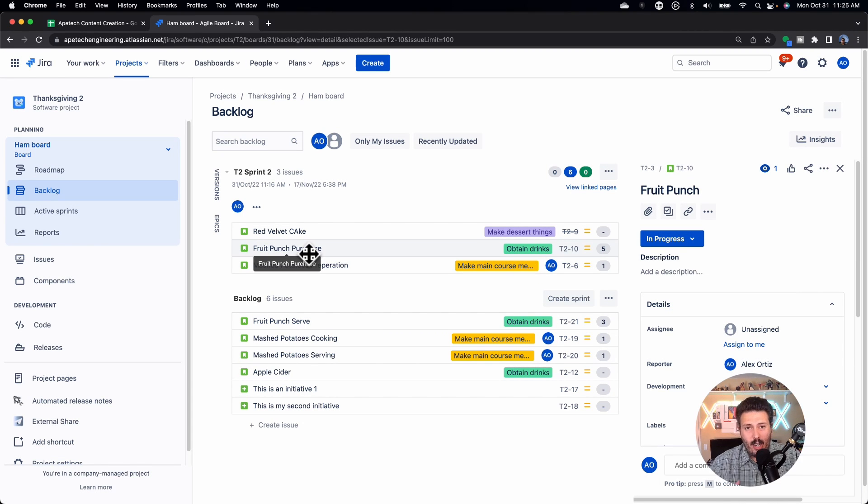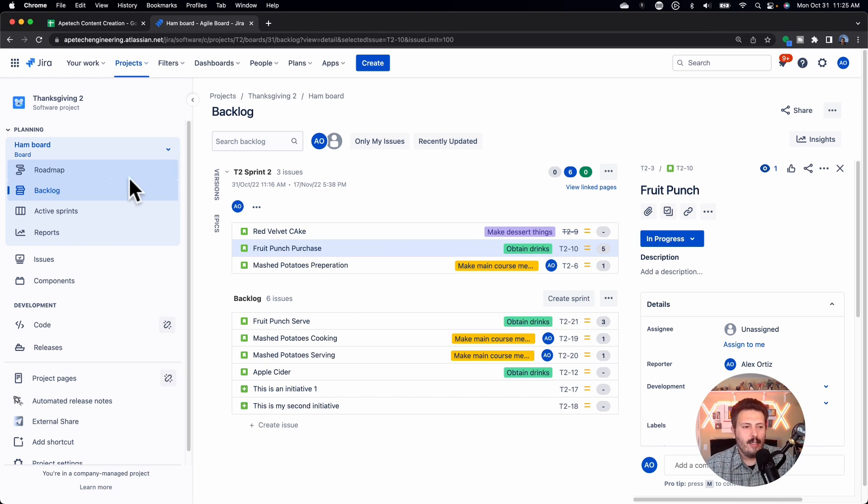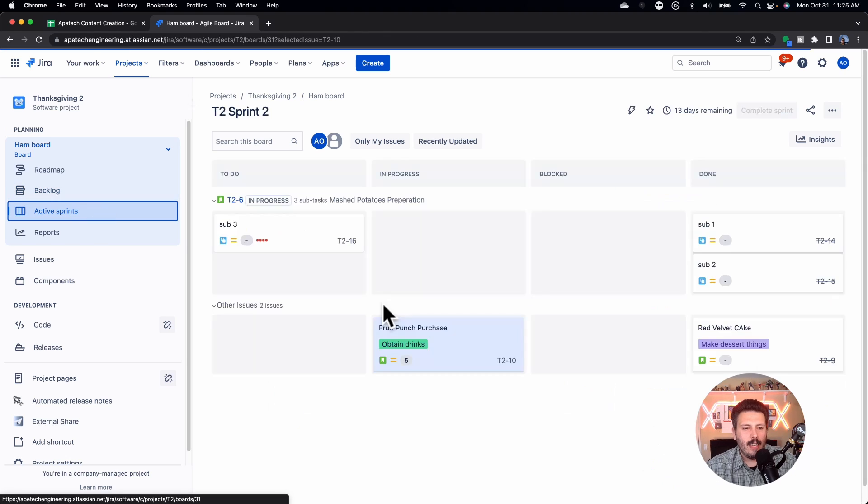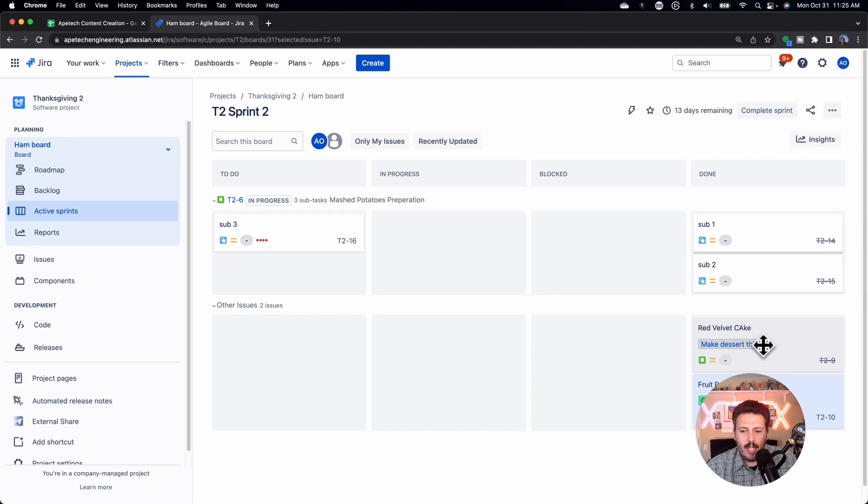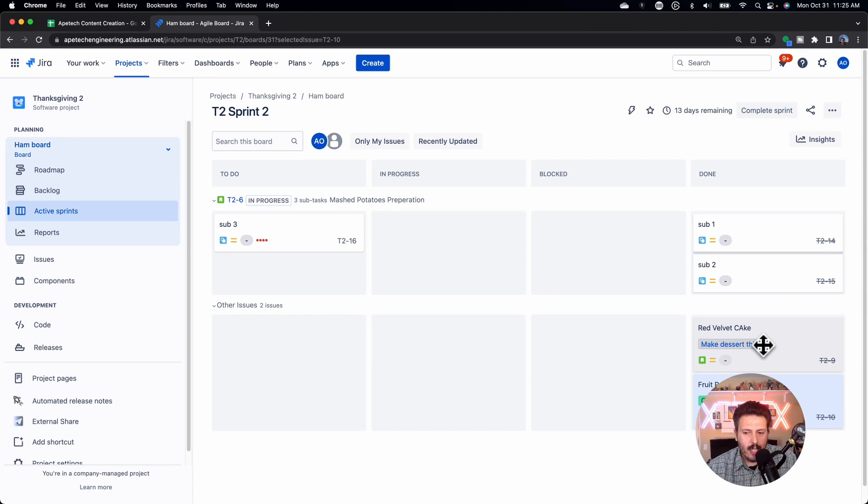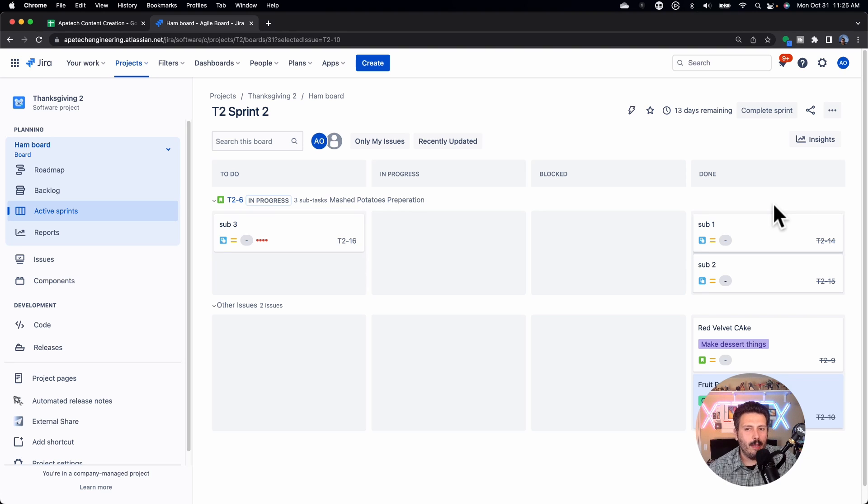And now you can essentially close the top one because it's done. You're taking credit for the work that got done. And then in the next sprint, we're going to just do that delta, whatever's remaining. And so over here, I can comfortably do this, move that to done. And now when I complete my sprint, I can take the right credit for the right work and not have to worry about rolling the whole story over.